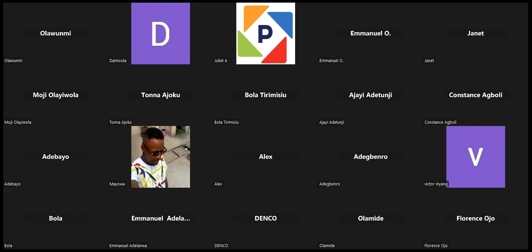I don't know the originator, but it goes 0 plus 1, 1. Let's just keep 0 to make it easier. 1 plus 2, 3. 3 plus 2, that's you take a step back to what you added. So 3 plus 2, 5. 5 plus 3, 8. 8 plus 5, 13. 13 plus 5, 21. Yada, yada, yada, like that, right? But you cannot put a story and tell me the story is 86 story effort or something. Or that means the story is too big.